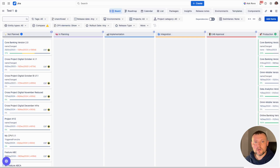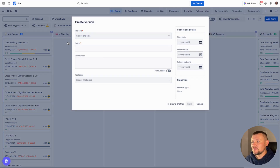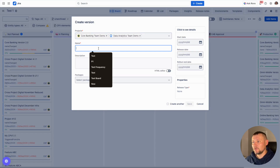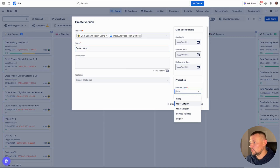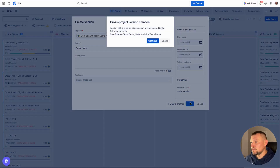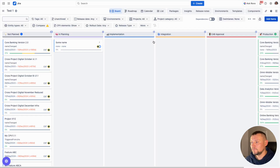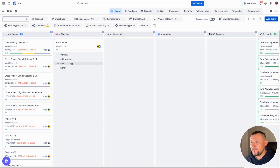As soon as we have configured the board, we can move beyond fixed versions and start creating other release types. The most demanding one is creating cross-project versions. We are able to select several projects, define a name, and as a result create a cross-project version in multiple projects. Another type which could be useful is virtual versions, epics, and sprints.